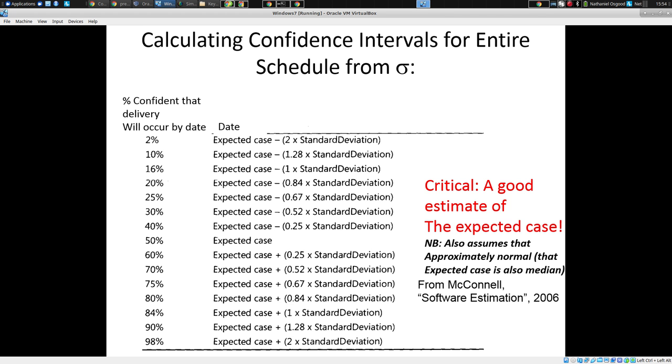This combination of range estimates, ideally these three-point estimates, that are compensated, together with the need to tell managers always a range rather than a single number, can go a long way towards shielding us from these things. The final component is decomposition. Going in and systematically taking apart each thing we need to do and thinking through what is required to do this, who might be doing this, how long would it take given their other commitments, given the dependencies involved.